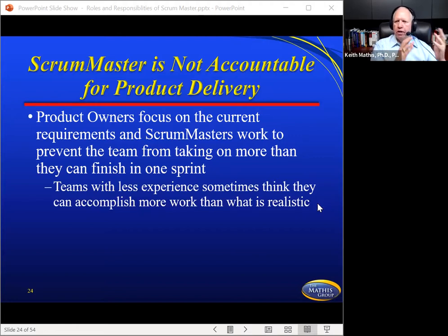So as you know, in Agile and in Scrum, at the end of each sprint, so let's say it's 4 weeks, at the end of each 4 weeks, you're supposed to be handing something off to that customer. And you're not supposed to be carrying that over and over and over again, because that's almost like a phase. And that's why I said some teams call themselves Scrum or Agile, and many times they're running things like a phase.